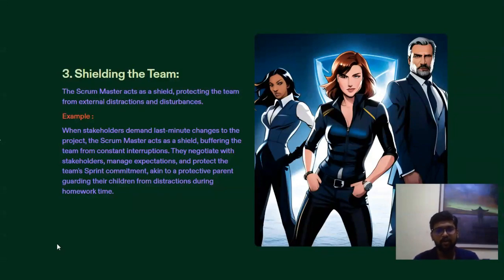That is one way. The other way is, if that task is really important for the stakeholder, then you can prioritize that task and deprioritize another task in the sprint. Okay, and add that in the sprint commitment properly. Okay. Just like that, you are required to shield your team.